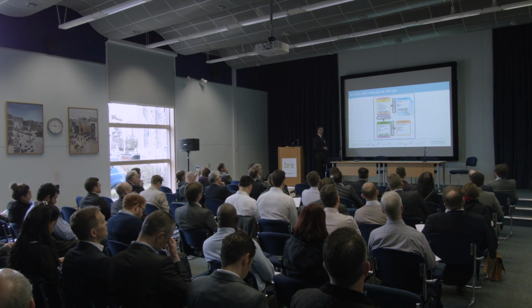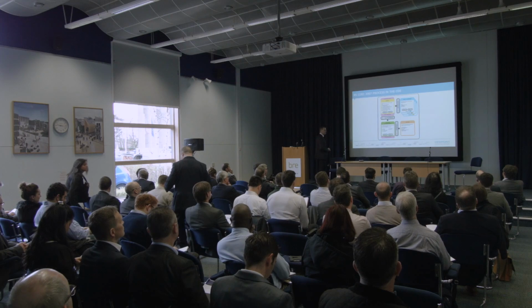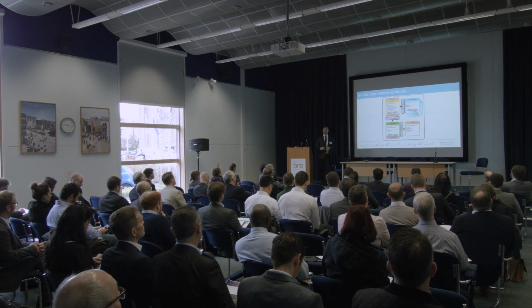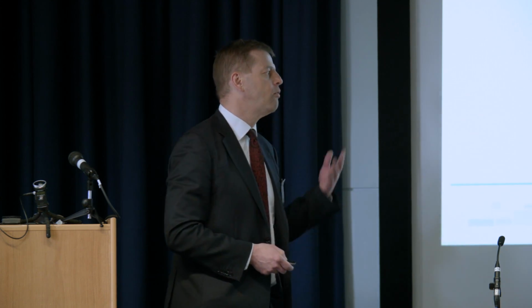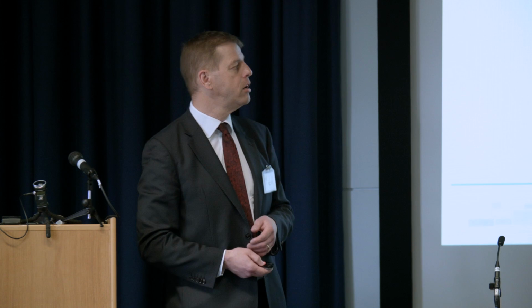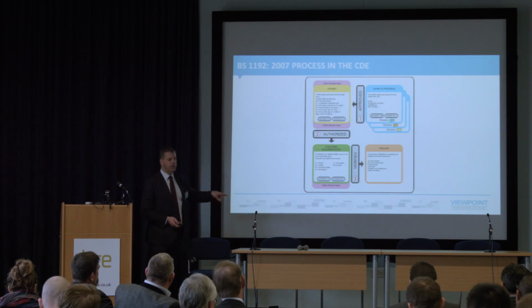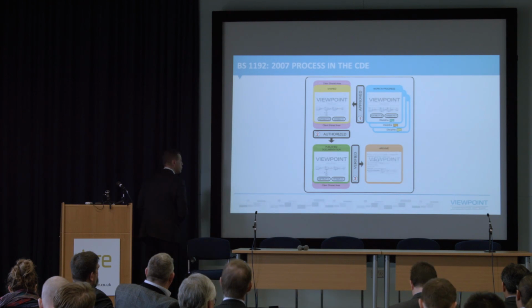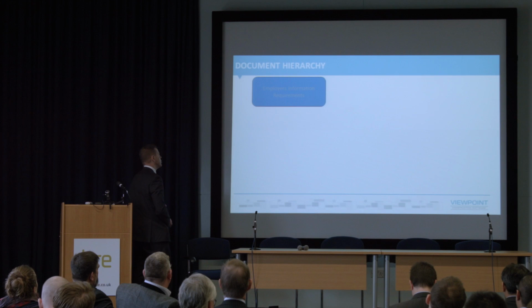So from work in progress, this is stuff that you're doing within your company, to shared information, I'm now going to allow this to be coordinated, clash effect, whatever it happens to be, to published, which just means that it's now a document satisfying something like a planning application or a contract document, or one of the deliverables defined in the EIR. And finally, to archive. So that process ought to be able to be monitored and approvals recorded, and you should be able to do this through a series of effectively workflows.